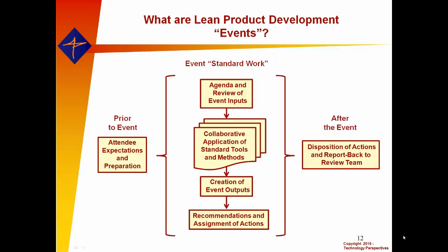And that transformation may take several iterations, and it may take a day or 2 or 3, but it's absolutely pivotal in the success of the remainder of the project. So even though we're putting a fair amount of focus and attention up front, the reality is that this is going to drive the 6 months, year, 3 years of development that follows, and it couldn't be better time spent. The output, again, is a templatized output, and if there are open issues or TBDs, we capture those, assign actions, bring the team back together shortly thereafter when the information is available, merge that information, and close the event.